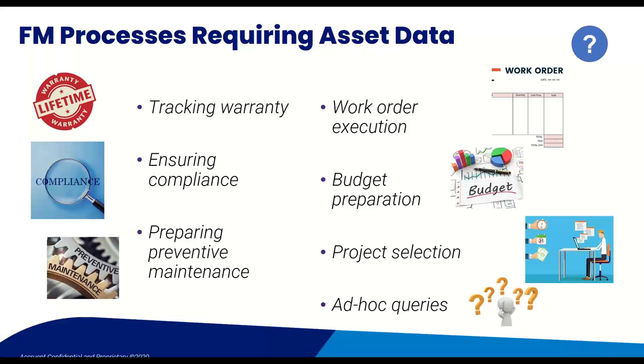So you would need to know how much roof there is to be insulated, what the insulation level is at the moment, what the amount of heating that can be saved if all these roofs were upgraded to a fixed insulation level versus how many windows are there, how many need to be replaced to make everything double glazed, and what would be the savings of that. And then with all that information, you can make an informed decision about how you can best spend your budget for that energy improvement.